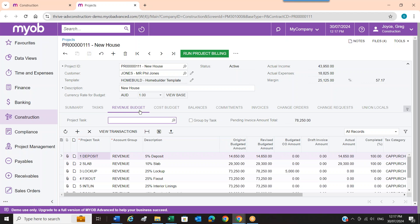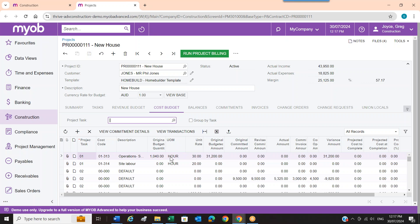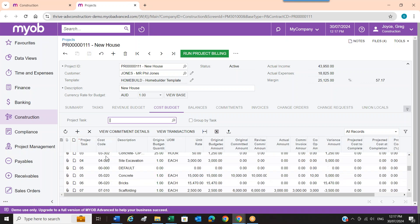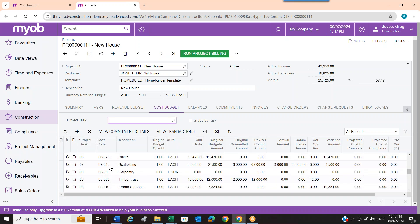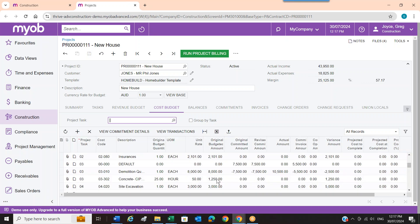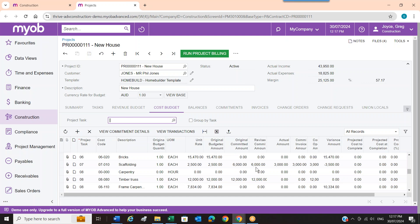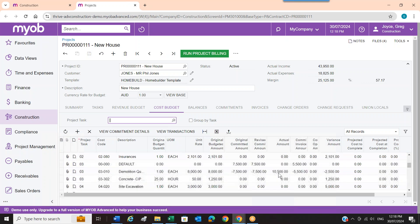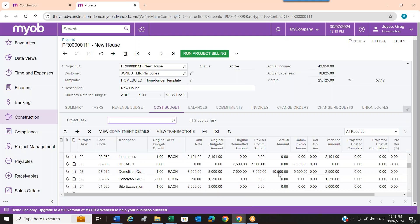Once I get the revenue budget and cost budget in, I can see the balances — essentially a profit and loss on the job. The revenue is the total revenue budget, and the budgeted amounts are the total expenses. You can see change orders that have revised the budget, committed amounts, and actual amounts. These will continue to fill as I place commitments, enter accounts payable invoices, and put purchase orders in. I can also just click the plus sign to add rows manually if I'm not importing.